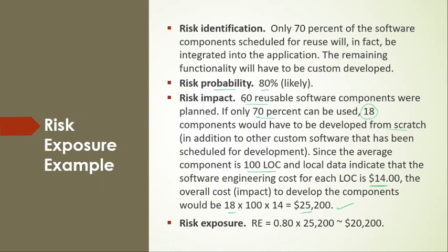80% is what we have given here. The risk probability is 80%. That means 0.80 into the cost, the risk cost to the project, is similar to this. It may not be an exact figure, because this is simply a rounded figure of this product. Clear? So this way we can find out the cost calculated here.